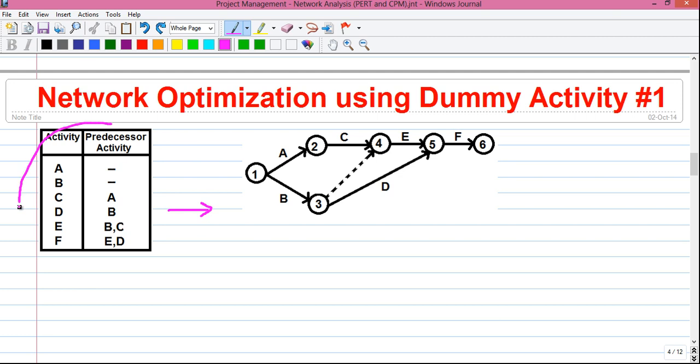Here you are given a table of activities and the predecessor activities. The predecessor activity is an activity which must be finished before the actual activity can start. For example, here the activity A must be completed before the activity C can start. So how to draw the network using this table? I will tell you.